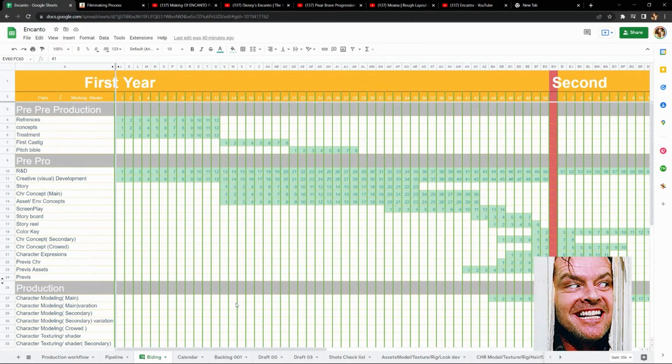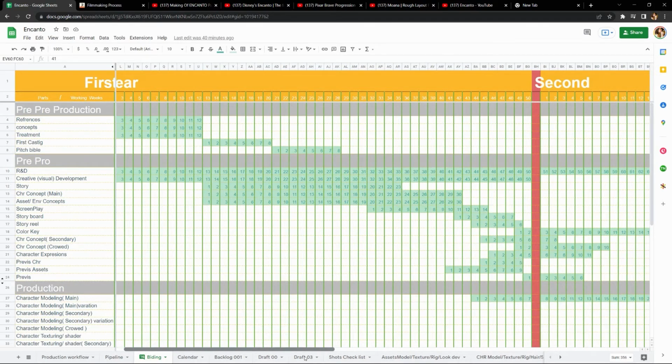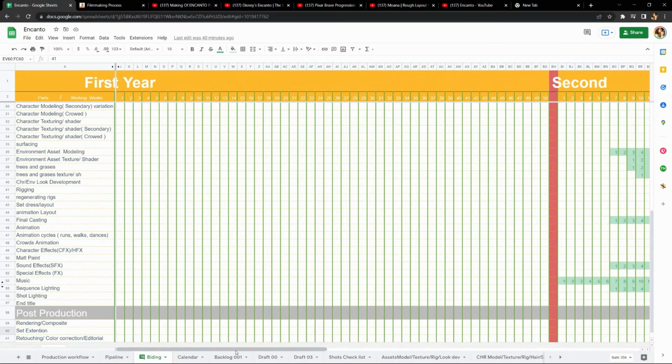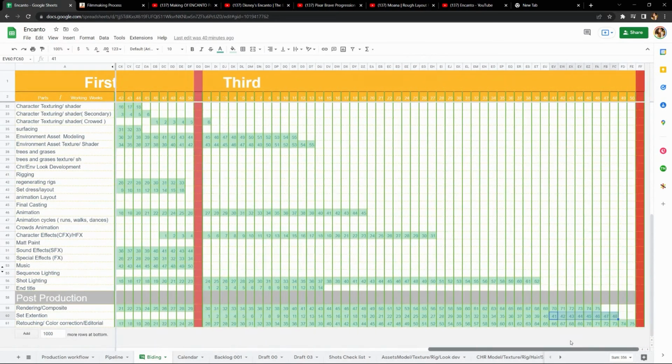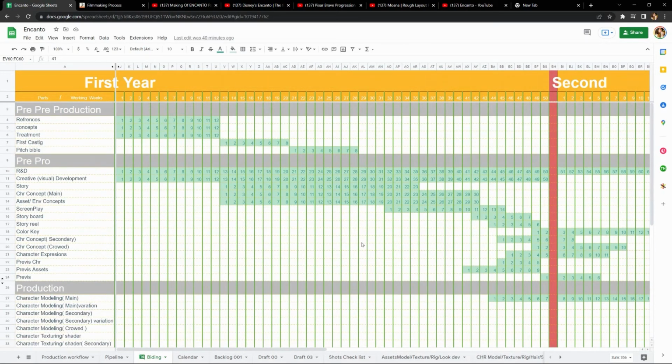Then plan another meeting with the networks for considering parallels, which means which kind of groups can work at the same time. Let's go through the timeline and the deadline. You must identify how many artists you would need for each part. When you gather those data and put them in a table, good for you, because the bid appears.